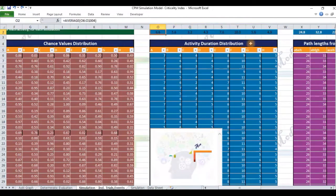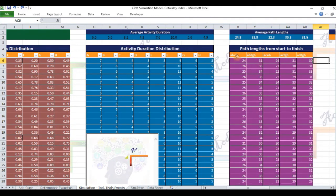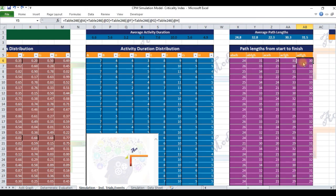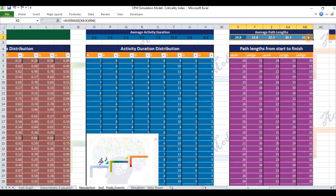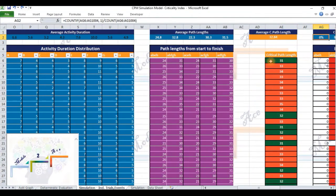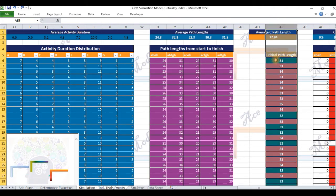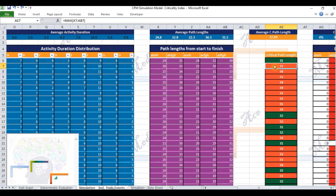Looking at the cumulative probability column corresponding to activity A, 0.86 lies in the range bounded by 0.65 on the lower side and unity on the ceiling. So the model picks the corresponding value of 7 to generate the actual activity duration for activity A. Row 2, columns O through V give the sample mean of these activity durations. For each combination or set of activity durations, the model computes the lengths of possible paths from start to finish: A, B, E, H; A, B, F, G, H; A, C, E, H; A, C, F, G, H; and A, D, F, G, H. Row 2, columns X through AB give the sample mean of these path lengths. The model calculates the sample mean of critical path length values in cell AE2. Column AE values less than the mean are color coded in green, and values exceeding the mean are shaded in red.